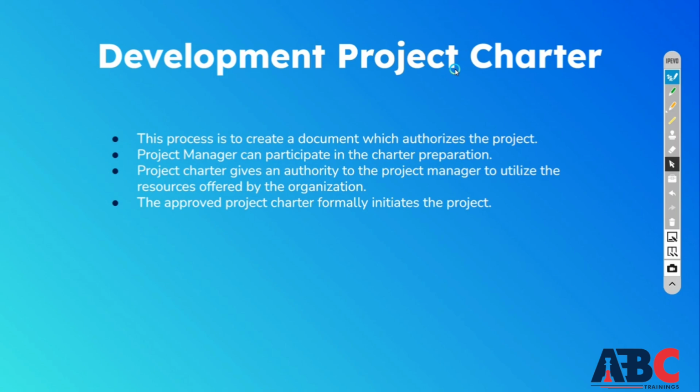Inside this project charter, your project manager participates and prepares the charter. The project charter gives the authority to the project manager to utilize the resources in a good manner, which have been provided to them by the organization. You have to make a project charter accordingly. That authority is given to the project manager, and the project charter formally authorizes your project to initiate. Your project starts from here.